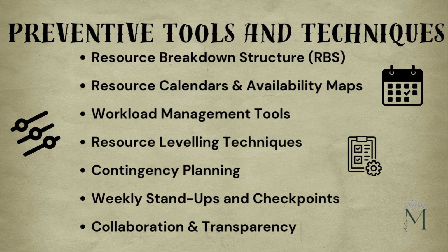Use resource leveling to adjust timelines based on resource availability. It might extend your schedule slightly, but it prevents burnout and missed deadlines. This will give you realistic timelines with better team health.